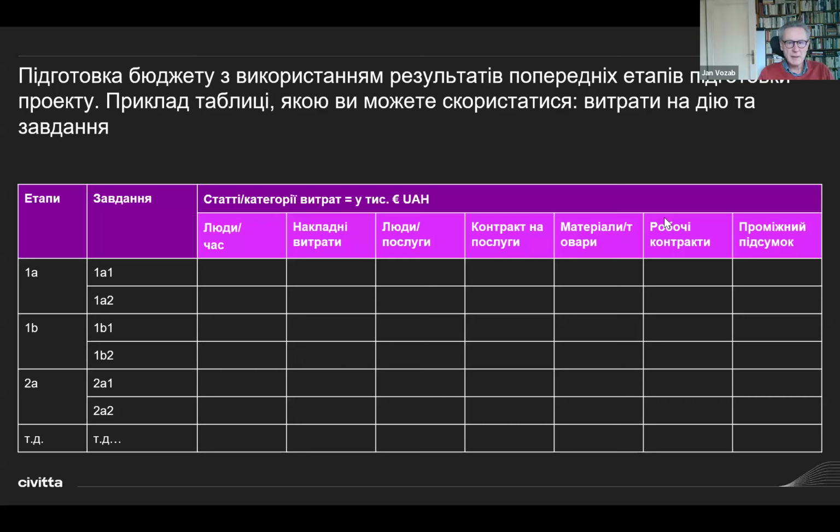And if you omit any money in your budget, then you have to pay it anyhow by yourself from your own funds, because you will have received money for delivering the outputs that you are obliged to deliver, and any omission of any expenditures or costs is your risk, and the donor doesn't care about it.